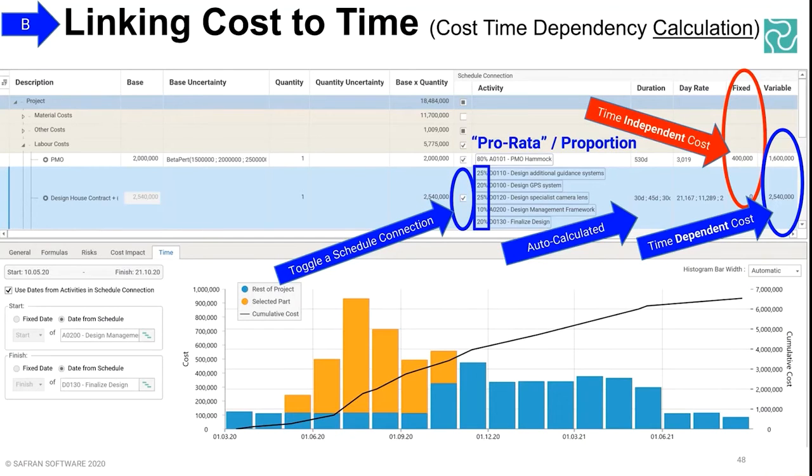And then I began proportioning and prorating different things with no particular knowledge necessarily, but I was able to make a very good guess with my understanding of the project, and then start running Monte Carlo with a fully integrated model, and then generating insights of where cost is really coming from on this project when schedule drives additional cost and such like. Incidentally, as a bit of an aside, you can actually have it the other way. Your cost model through correlation can actually drive the schedule as well. It goes both ways, which is something I have tested, and it does work.